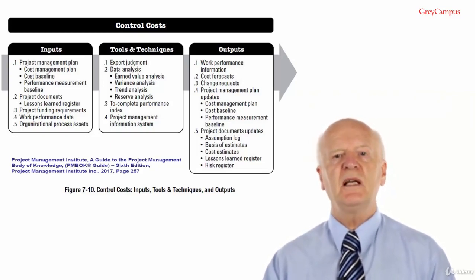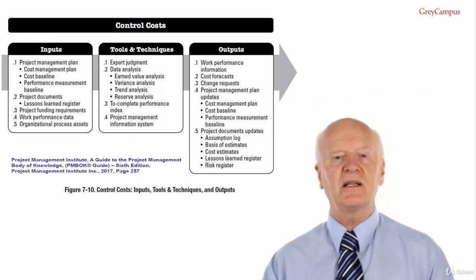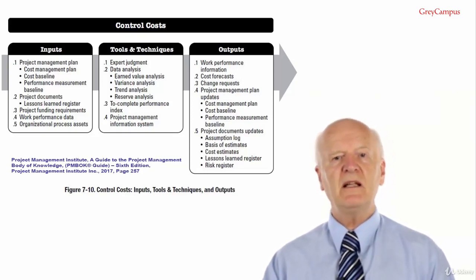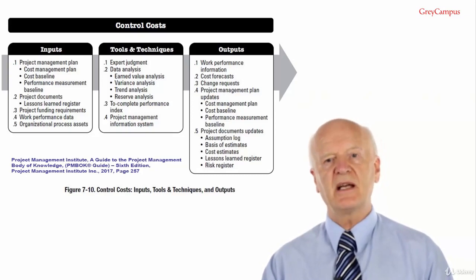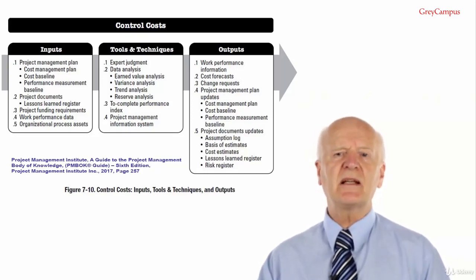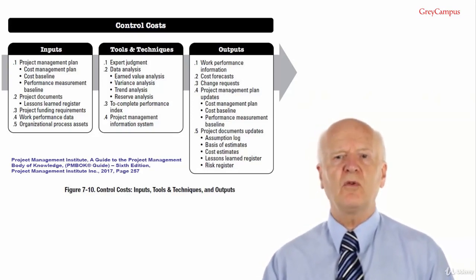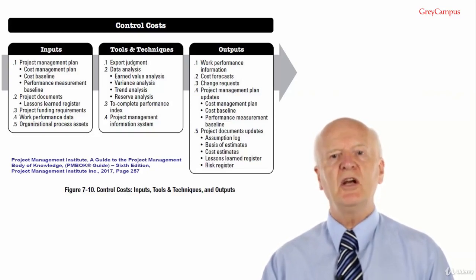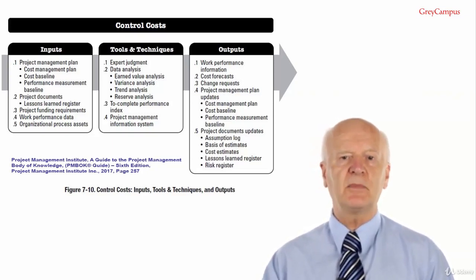Earned value management develops and monitors 3 key dimensions for each work package and control account: planned value, earned value and actual cost. Let's study these in detail. Planned value. Planned value, PV, is the authorised budget assigned to schedule work. But what does that actually mean? For an activity or work package, planning package or control account, the planned value is the amount of budget you had allocated for it back at the beginning.